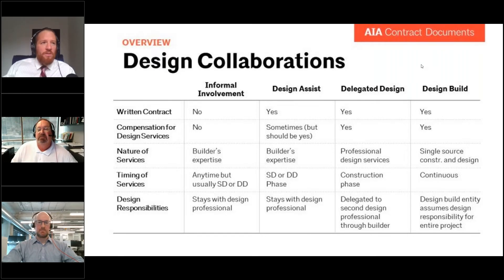The C403 document is termed a client-consultant agreement — there's no specific place for an architect in that agreement. However, the input that the consultant provides would find its way back to the architect's office and into the architect's documents. Design assist could occur at multiple levels of a project, so the agreement form needed to be flexible enough to be used in connection with multiple parties while still providing consistent terms related to the project.